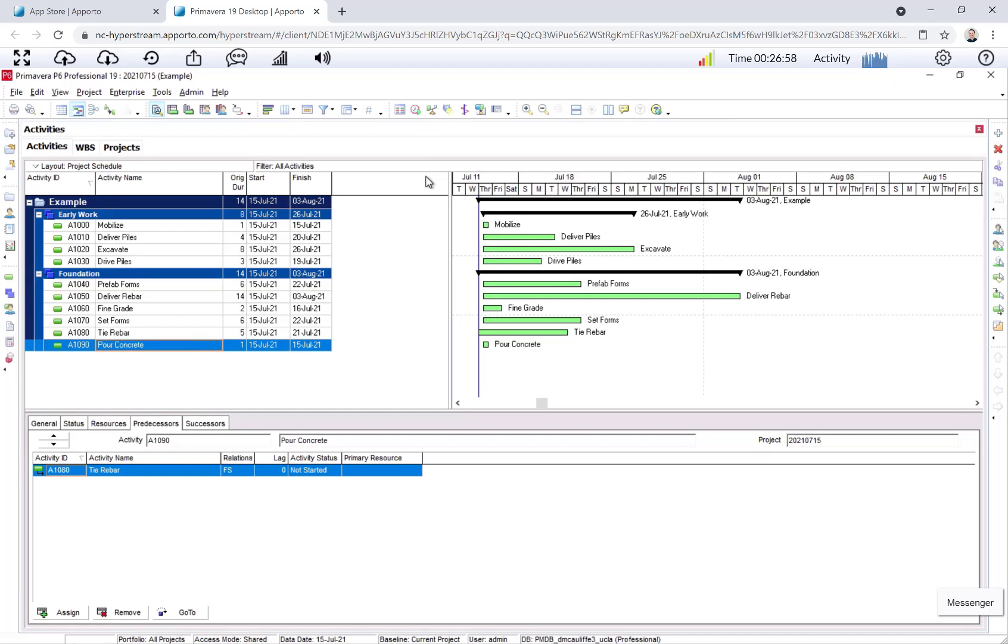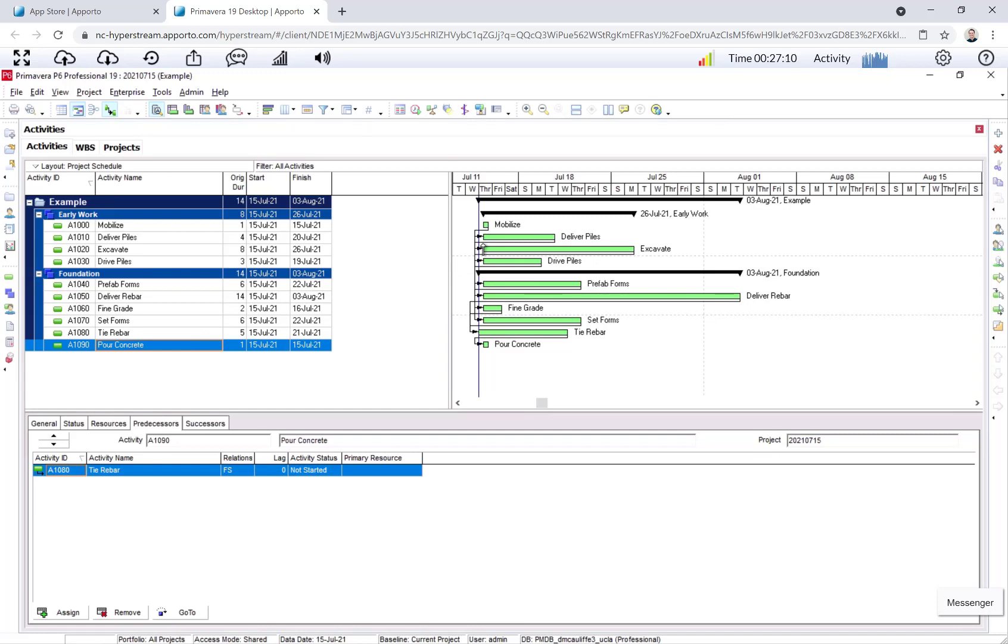It's nice when you're creating the schedule to make sure your relationship lines are being displayed. I click this button. I now see the arrows showing the finish to start relationships. That's good. But again, it doesn't look right because they're all stacked. They all have the exact same start date. So we can't really check if we did this thing correctly.